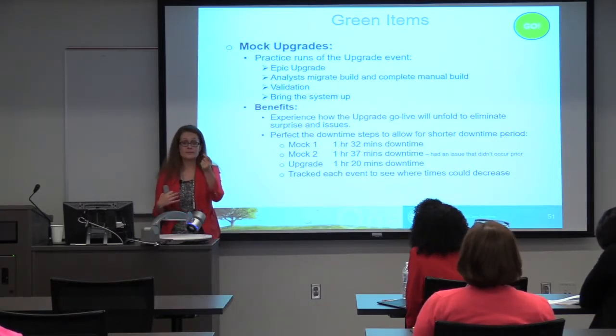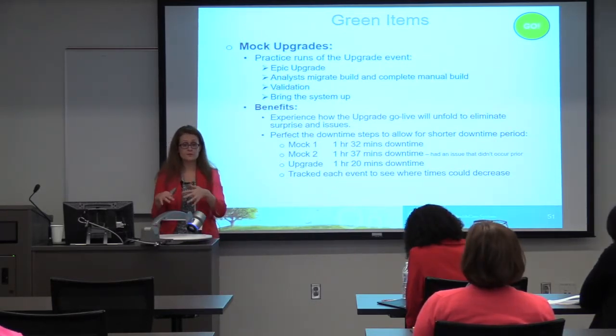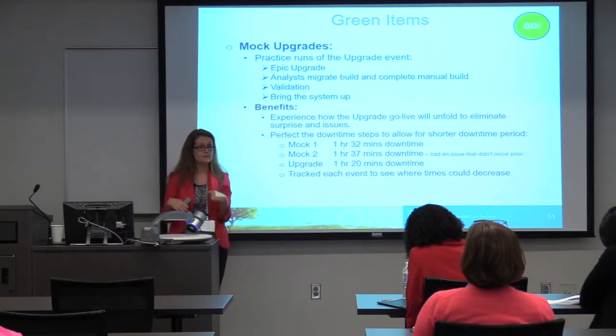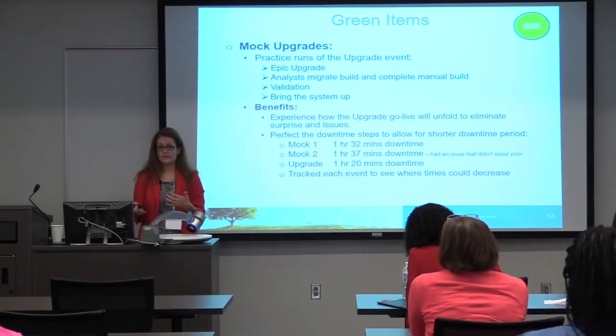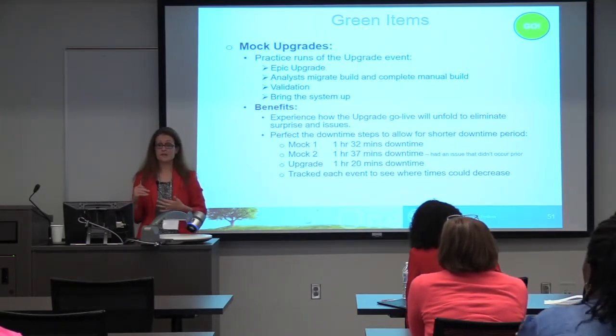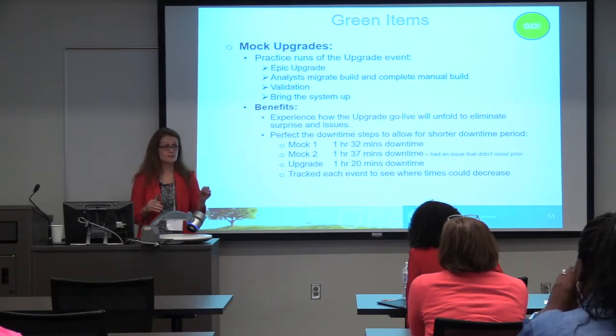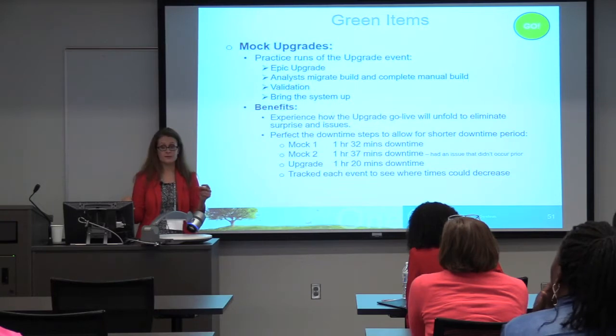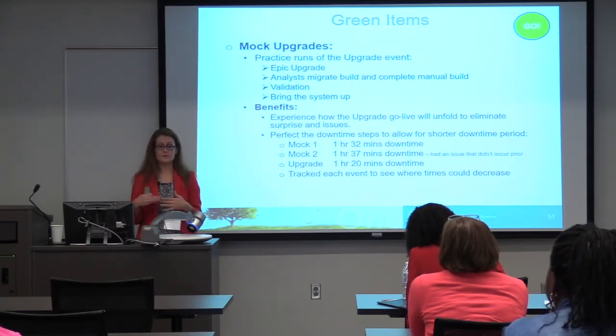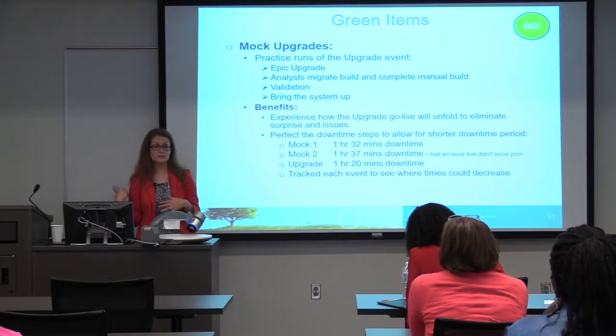What are the cues that I'm going to give you for you to do your steps and give me back so that I know you're done? What issues are we going to run into? We found out this X, Y, and Z does not work, so we've got to put fixes in place before the next mock upgrade so that we can perfect our process and our build so that when we really go live on the upgrade, we've got it down to a T.